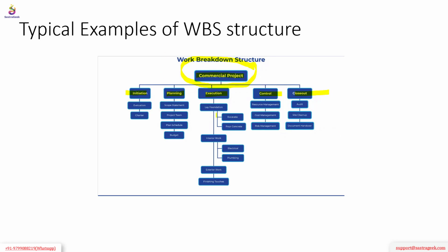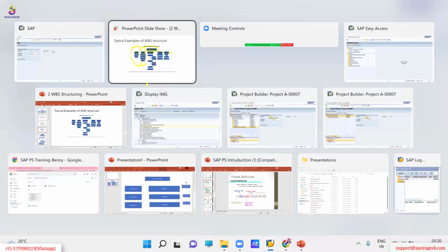If you define a budget, say 17 crore, at the project level WBS element, you can distribute it. From a reporting, controlling, and scheduling perspective, a level 1 WBS element should be there. It varies case to case. If you want, you can define this whole assembly as sub projects: initiation as one sub project, planning another, execution another. With reference to that sub project, you can evaluate what is my planned, what is my actual, planned progress, actual progress, POCs, etc. I hope it is clear now.